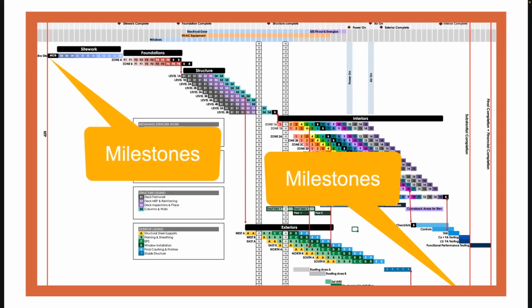In the past, people have said, hey, don't do this because you don't know if your schedule is too conservative or too aggressive, right? There's no way to check it. But nowadays we have a way to check the speed of these phases with what's called the realized flow potential percentage, which means that we can tell when your phases are within the proper ranges. So this is verifiable. So whether you have a start and an end date and you just fit the Takt plan in between, or you have a start date and then you build it and tell the owner when we can finish, either way it's fine as long as you have the proper throughput for the overall project.